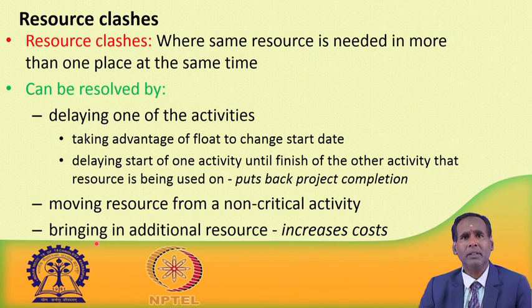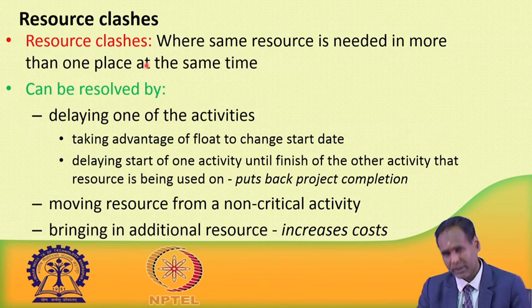Another possibility is bringing in additional resources. If it is not possible to move resources from other activities or delay the activities, then what can the project manager do? He can bring in additional resources, he can hire additional resources to meet the target dates. Of course, this will increase the cost. So, these are some of the possible methods, solutions for resource clashes.